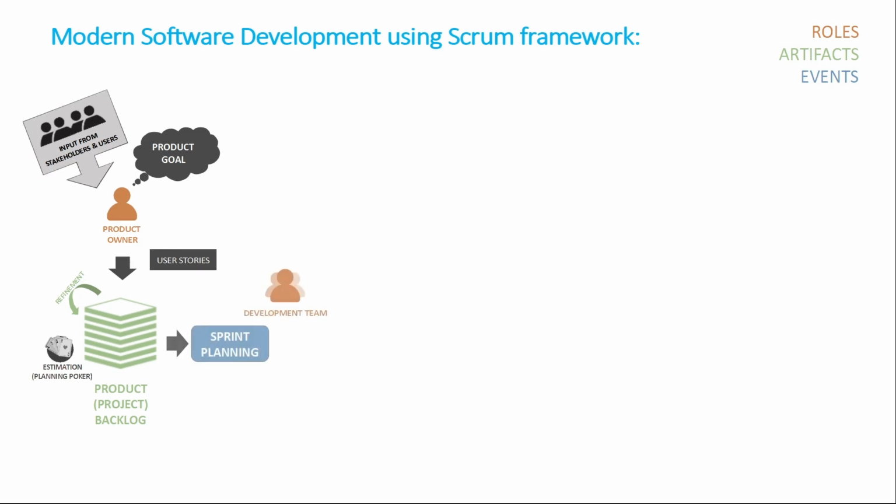Then an event or meeting called sprint planning is held. This event initiates the sprint by laying out the work to be performed for the sprint. The product owner proposes how the product could increase its value in the current sprint. The whole Scrum team then collaborates to define a sprint goal that communicates why the sprint is valuable to stakeholders. The sprint goal must be finalized prior to the end of sprint planning.